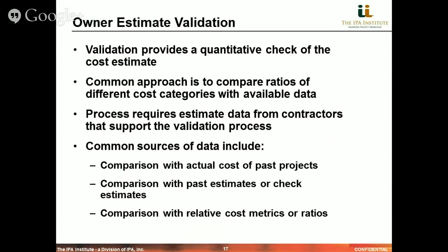The problem is that this process requires estimate data from the contractors in a format that supports the validation process. But it also requires that we as owners have these data in a format and a granularity that make it possible to do any type of detailed ratio analysis to check and validate the soundness of the cost estimate.